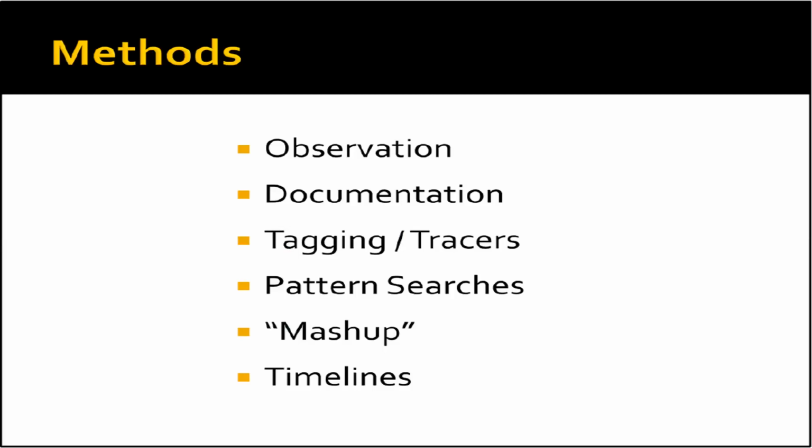Additionally, you want to make sure that you have reviewed a method to create a timeline for tracking. What is the frequency with which you are going to determine project success? How long does the success need to be sustained to achieve the required ROI? Well, different measures require different tracking timelines. For most projects, a combination of these methods is required in order to provide the documentation of the deliverables for the project. And, as before, determining the methods at the start of the project can help you to obtain valid baselines and document impact and results.